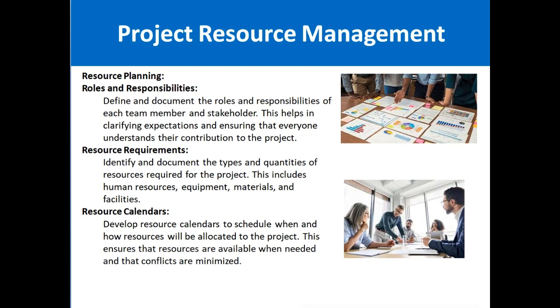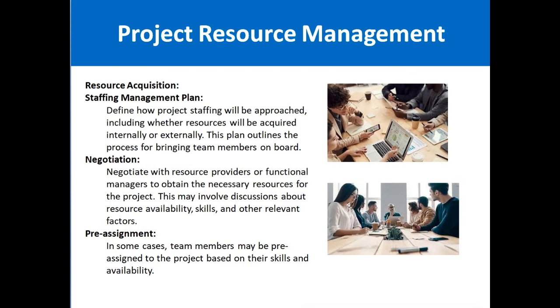Resource calendar should be clearly mentioned. Resource calendar means month-wise, calendar-wise, what is the availability of the resources. This ensures that resources are available when needed and that conflicts are minimized. For example, a few resources are going on leave, a few resources are not available due to some personal reasons, or a few resources are shifting their job, etc. So you should have a proper calendar in which you know in which month how many resources would be available, and who would not be available.